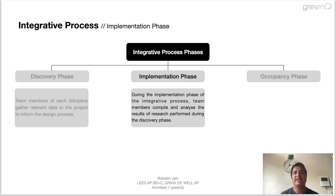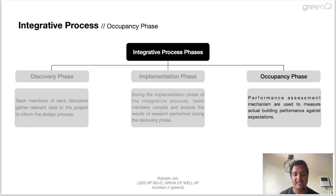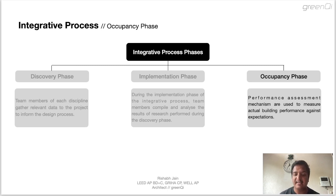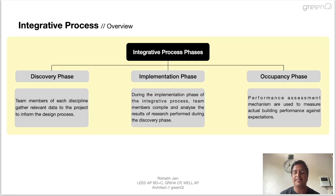For example, during the implementation phase, the project team is asked to review how the energy modeling done initially affected the owner project requirement, basis of design, and the design eventually. The third phase is the occupancy phase. In this stage, the building performance post-occupancy is measured and compared with the predicted figures calculated in the previous stage. In case there is a discrepancy or the performance does not meet expectations, a commissioning or an inspection can be done to rectify the issue. Please pause the video and take a note of these integrative process phases.